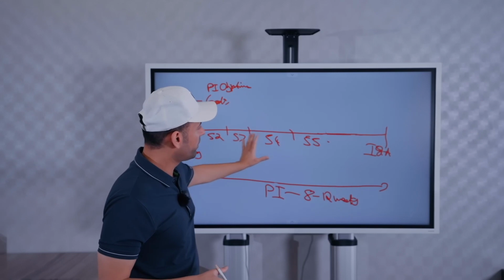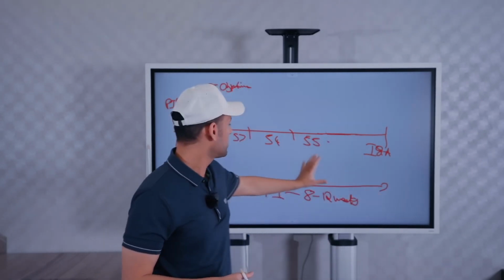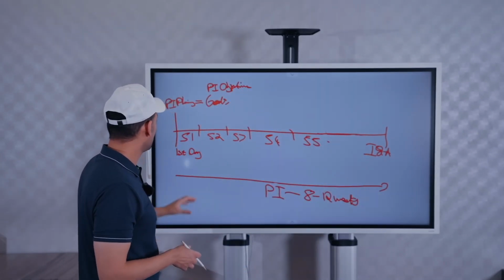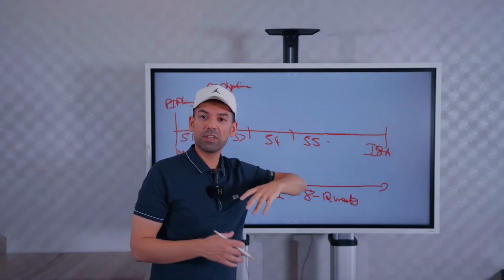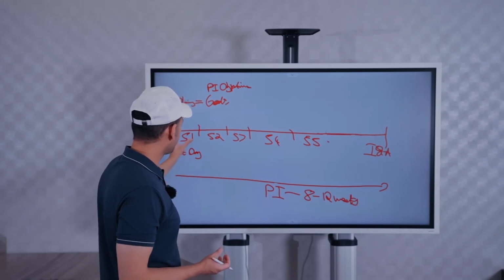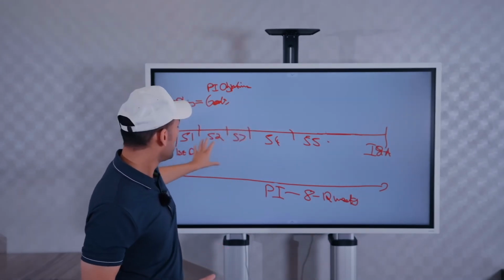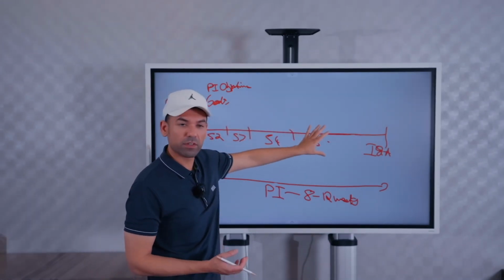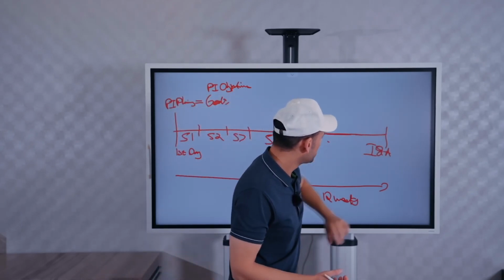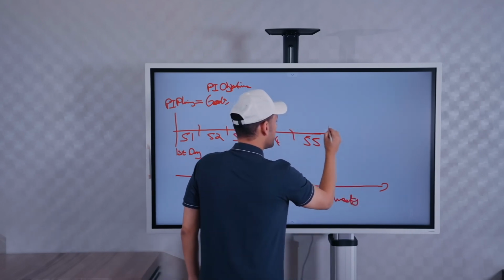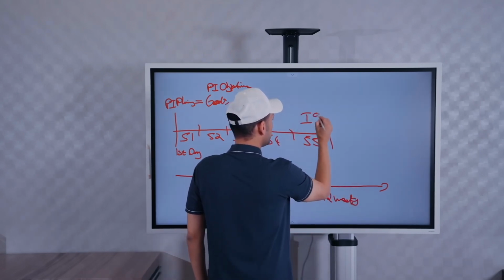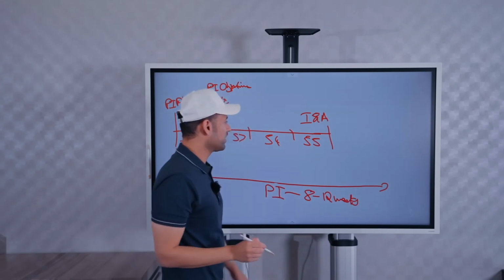And this is the full methodology here. This is the full framework here that you can see. PI planning is the first thing, which allows you to decide on what the PI objectives are. The 5 teams start sprinting and they start delivering the work here. And then towards the end, in sprint 5, the inspect and adapt workshop is happening.